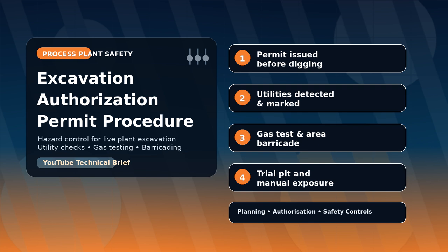Then you need to request the engineering services, like for the refinery, there will be engineering services, so that you get plot plan drawings of that particular location. You want to see the piping plan drawings, UG piping drawings, or cable trench drawings and everything.